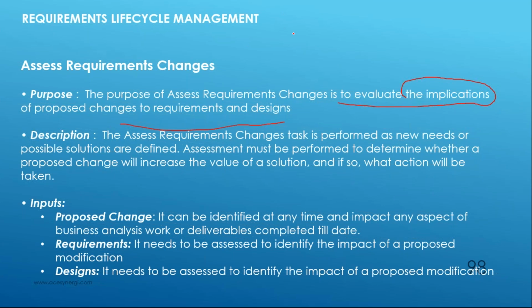Now, as practicing business analysts, most of you would know, you have a BRD. Once it gets baselined, if changes to the BRD have to be made, they have to undergo a proper change management process. That's what you would have to do.